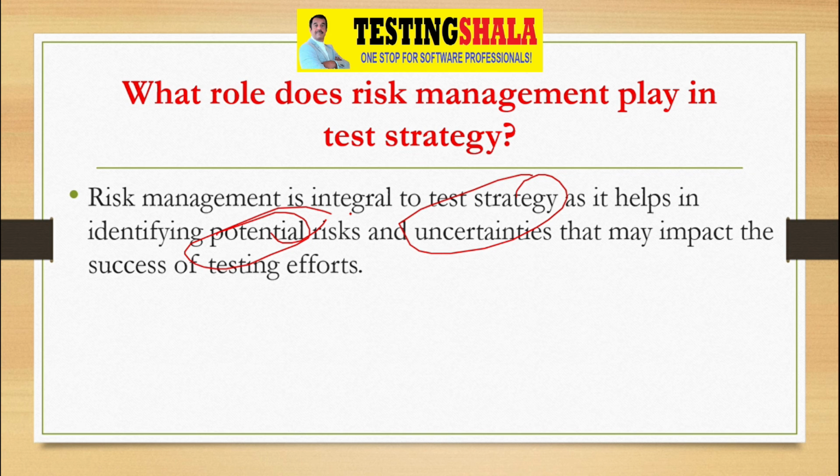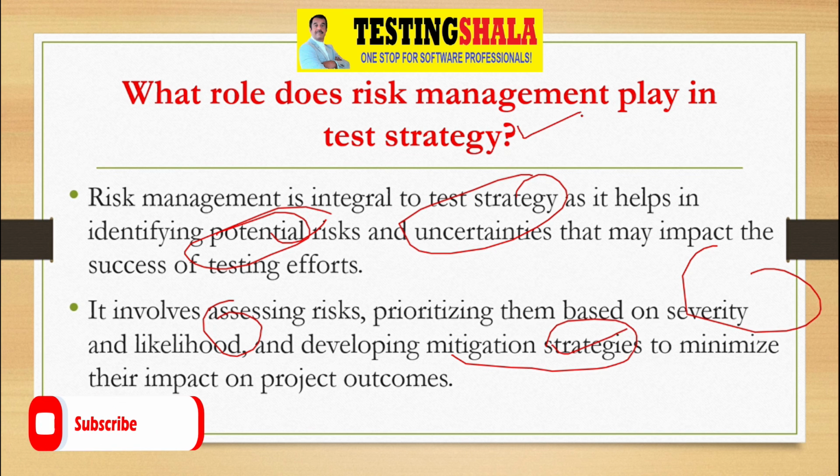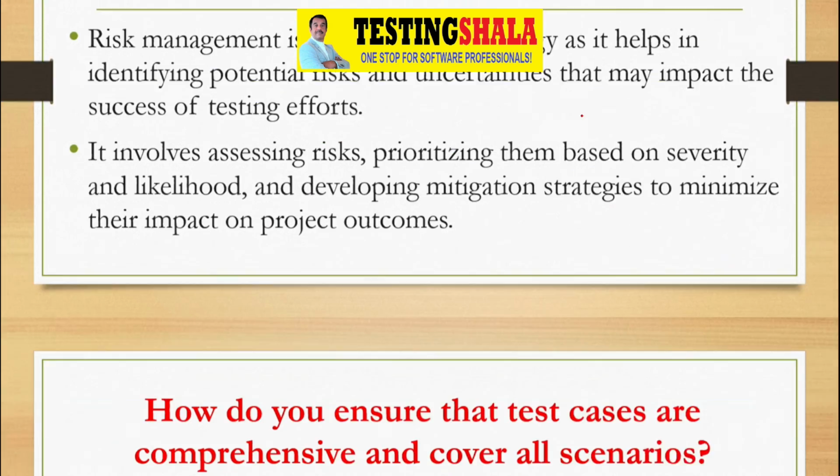We should do all those assessments. Based on that, we have to put a mitigation plan in place and prioritize risks based on severity or the likelihood that the risk will happen, and the mitigations we have to adopt, so that we can practice the right risk management to achieve success in any testing project.